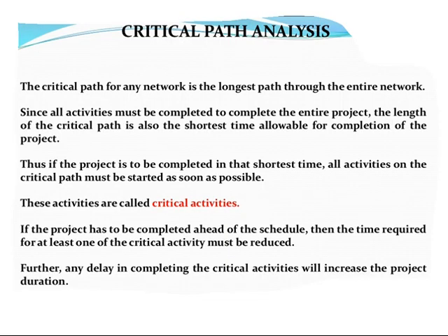Then the next topic is critical path analysis. I have been telling in the previous examples what the different paths available in the network diagram are. We need to analyze those. Based on the time duration to complete each activity, we need to calculate the critical path. The activities lying on the critical path will be called critical activities.